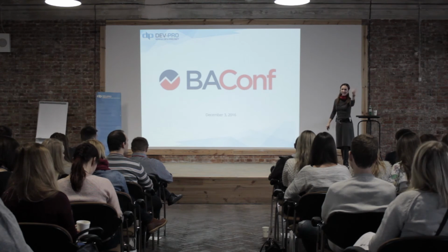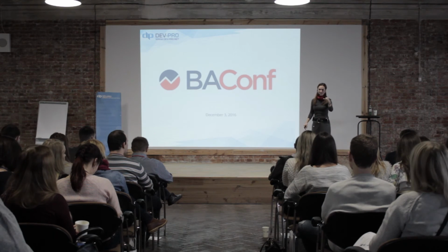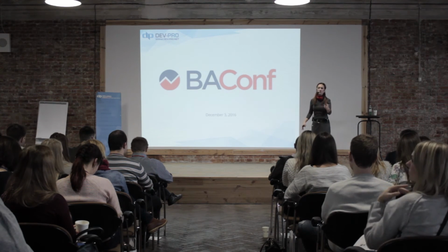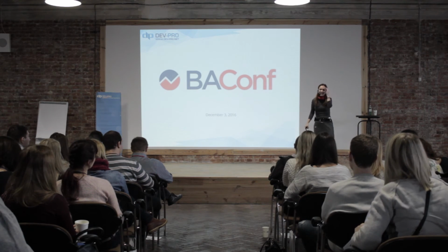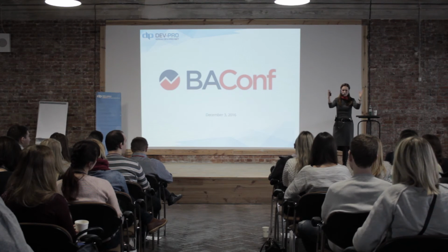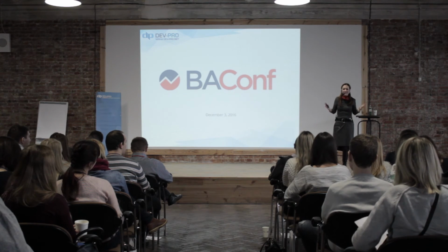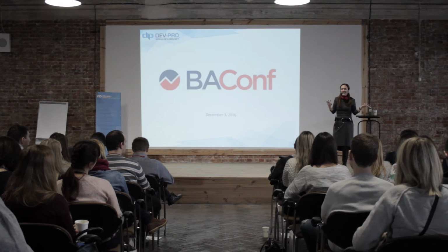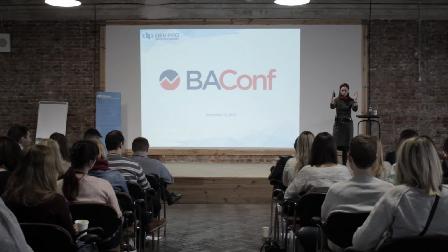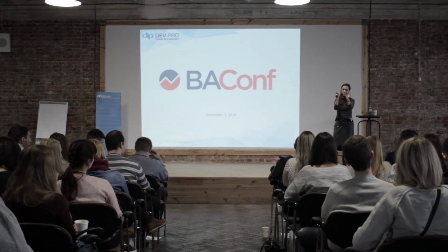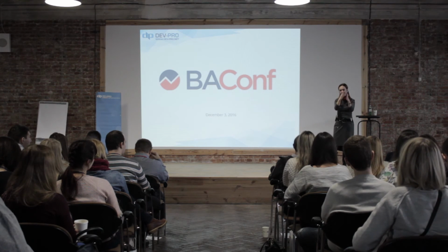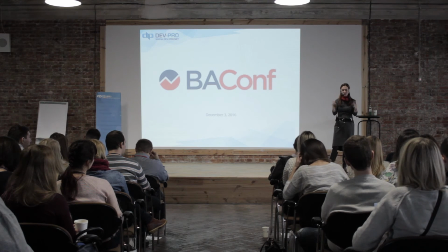Okay, first question. The earlier we have the input, the easier it gets later. So regarding input from the customer on what it should look like. Second thing, I think every human being, if you say we have 2 weeks, then we need 2 weeks, and that's it. When I talk to my customer, we clearly decide, okay, for this we need 2 days, for this we need 3 days, and then we have a buffer, which we might use or not. But this is clearly communicated when we start every sprint or timebox or package.